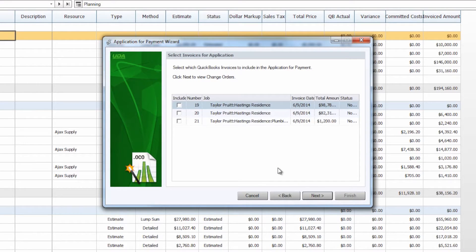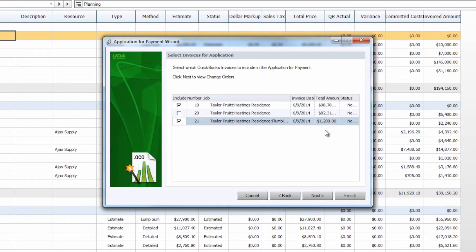The next screen is where you're going to include the invoices that are included in this application for payment. In this case we do have three invoices currently in our customer job in QuickBooks. You don't have to include all of the current invoices — the period-to date that you selected will determine which invoices are actually shown here. In this case we're just going to include our first invoice for the first stage payment of our job, as well as this change order invoice we have generated for $1,200.